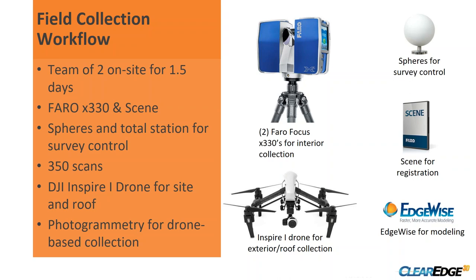Both of those were X330 scanners. We certainly could have used a shorter range, but that's the tool that we have in our toolbox. For most of these projects, we'll use spheres for the registration process in the scanning. We did not necessarily have to have a survey control on the site. It wasn't quite big enough to require it, but it's a good practice.